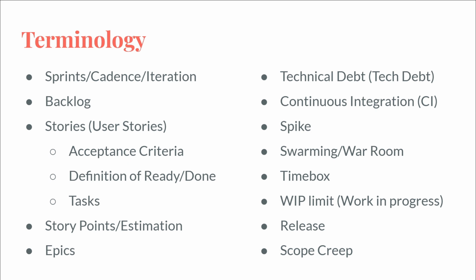And you can set a WIP limit and say, we probably shouldn't be exceeding 40 story points for the team, because if we are, then that's a problem. So that can be your WIP limit for a sprint, where you say, on average we complete about 40 story points in a 2-week period as a team. So when we're planning out this upcoming sprint, we'll bring in about 40 story points worth of tickets. Or it could be, we don't plan for a 2-week period. Instead, everyone is just pulling in work when they're done with their previous work, and we should have maybe 10 story points on average for our WIP limit.